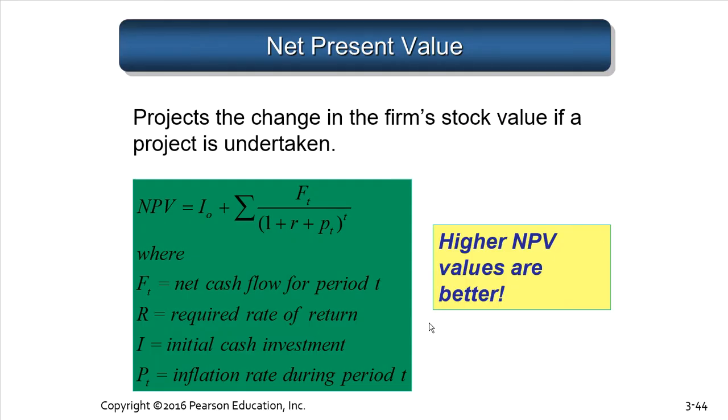So unless you have a really good strategic reason for investing in that project, you may want to put your money in a bank for a zero NPV. So just to summarize one more time, what is the NPV? That's the money I outlay today for the project plus all flows of money in the future, and each flow that comes in, I'm going to divide it by the return rate, and the return rate is really the going interest rate of the day plus any inflation, and you add them up.